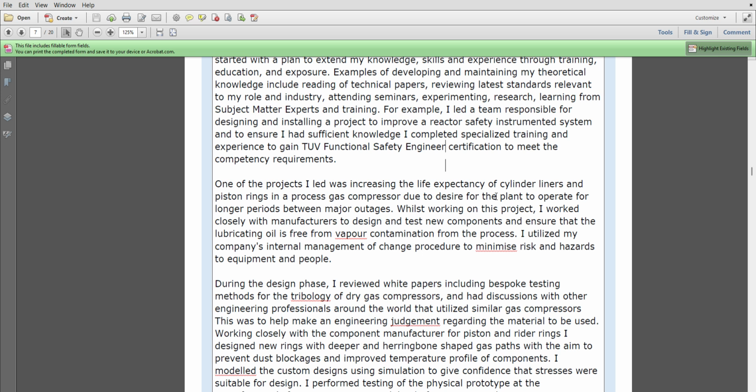And also in terms of change and change management, you are not just making changes on your own. It goes through a process. So you let them know what the process is like. Someone is proposing the change, someone is reviewing the change, someone is approving the change, and someone is implementing the change. So make sure that you make that very clear in your reports and, very importantly, in the interview.